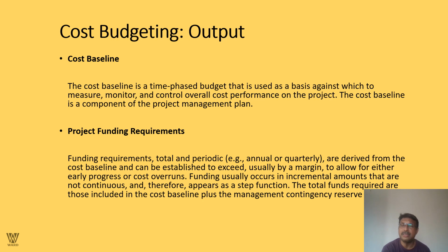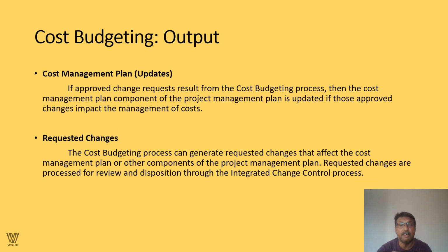Funding usually occurs in incremental amounts that are not continuous and therefore appears as a step function. The total funding required is that included in the cost baseline plus the management contingency reserve amount too.